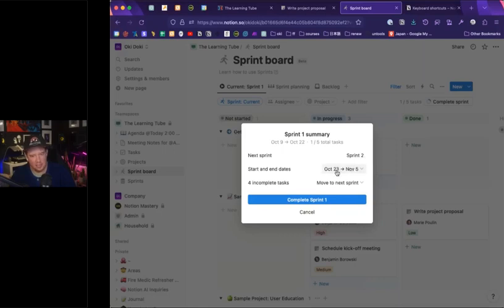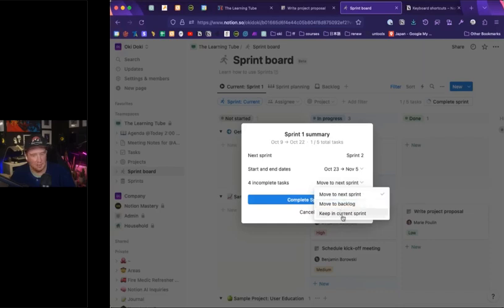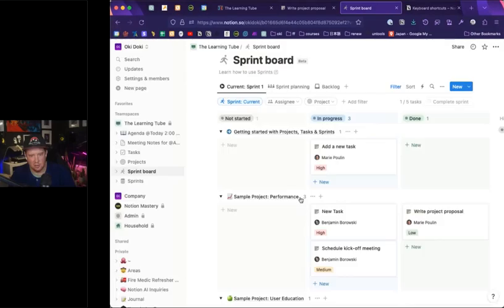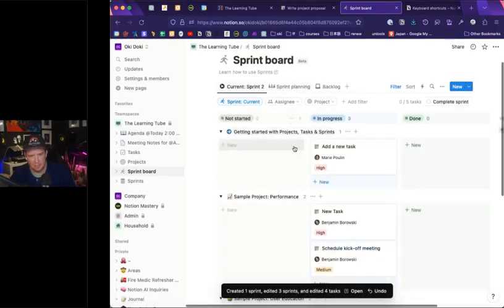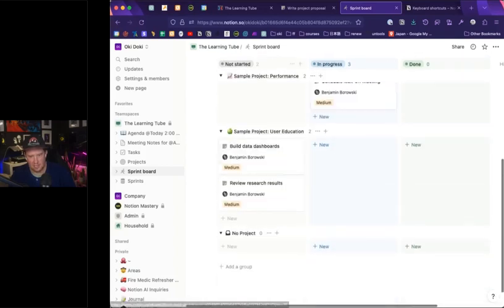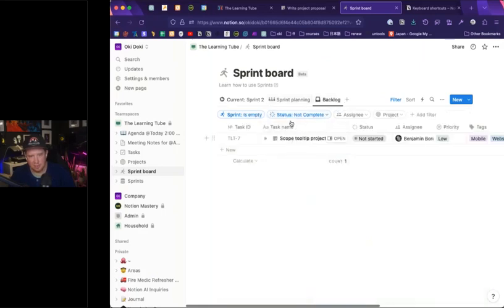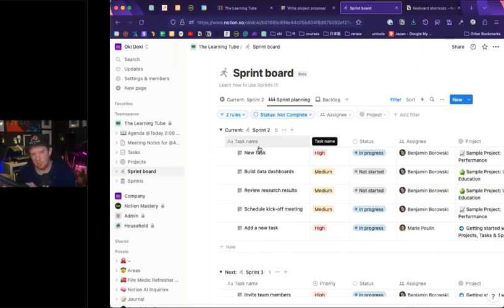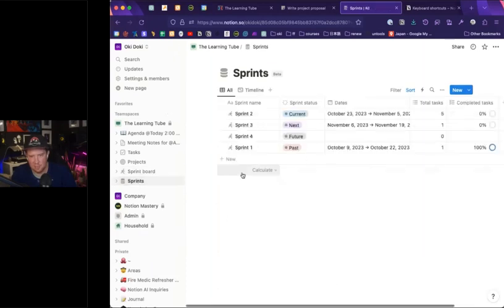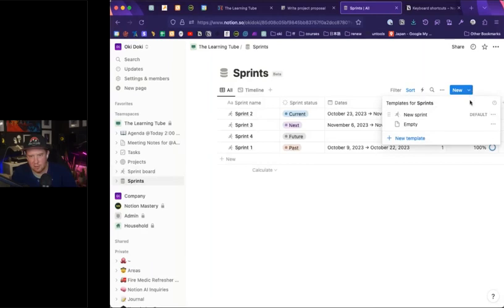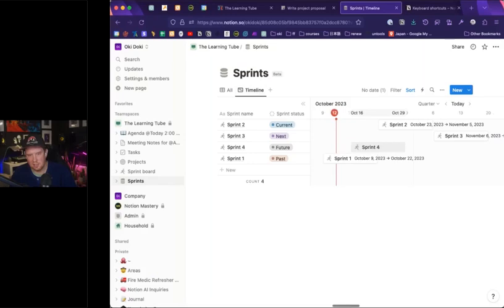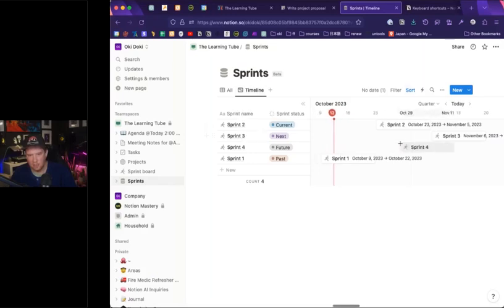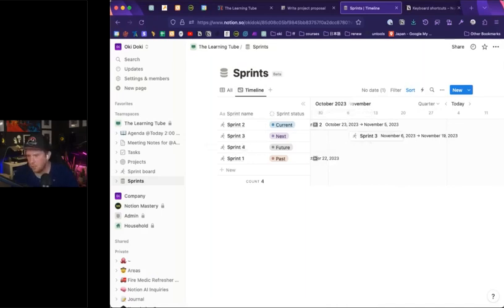When completing a sprint, Notion prompts you: the next sprint will be sprint two, with dates October 23rd through November 5th, and there are four incomplete tasks. You can move them to the backlog, keep in the current sprint, or move to the next sprint. Click 'complete sprint one' and you're now in sprint two, with tasks moved forward. If I look at my backlog, there's just one task because it's not part of a sprint. Those other tasks are now in sprint two. Notion has given us an almost Jira-style system — similar to Trello with boards and sprints.